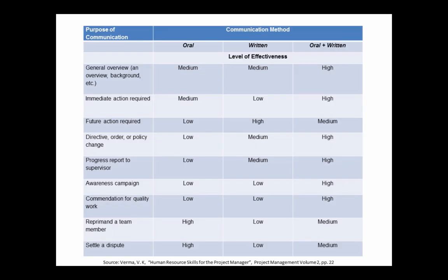This figure shows how the purpose of communication and the method of communication are so well related. If we have a general overview, such as an overview or background, the best way to do this is using oral plus written. If immediate action is required, it is best to again use both oral and written form. If future action is required, it is better to have that in written form because it may be forgotten if it's just spoken.